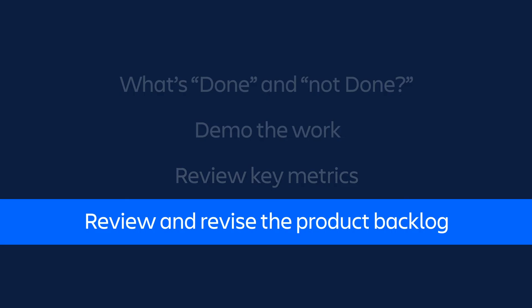The last step is reviewing and revising the product backlog. Now that the team has seen what has been built, it's good to take another look at what's up next. Teams often add new user stories or remove old ones as the implementations and intended effects become clear in the demo. If a new screen needs a fresh design or copy, we can take this time to kick that project off with Design and UX.